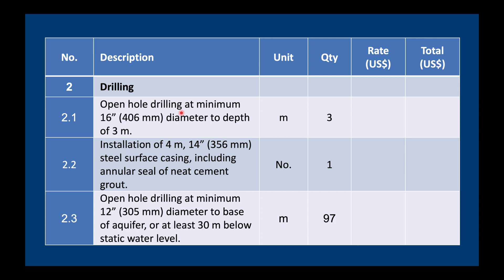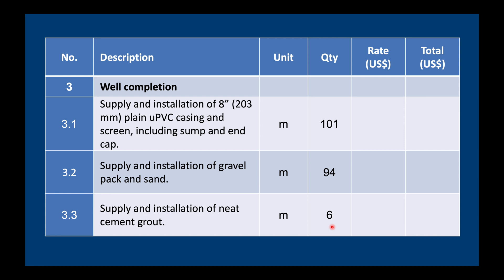Here's an example from Bill number two for drilling. We're going to be drilling the first three meters at 16 inches, install some surface casing, then continue open hole at 12 and a quarter inches down to the bottom of the borehole. The units here are meters and there's an estimated quantity — which of course is not exact and might change quite a lot. For the well completion, we're going to install 8-inch UPVC casing, gravel pack, and some neat cement grout in the top six meters.